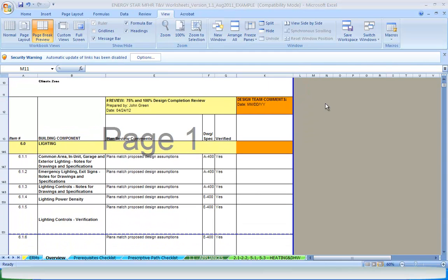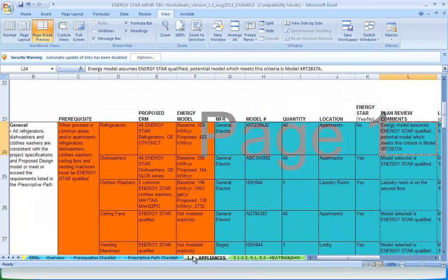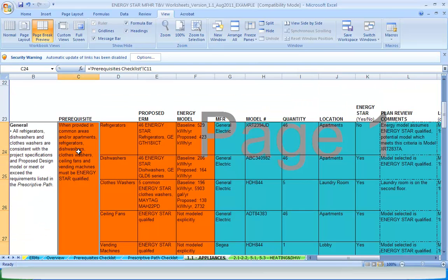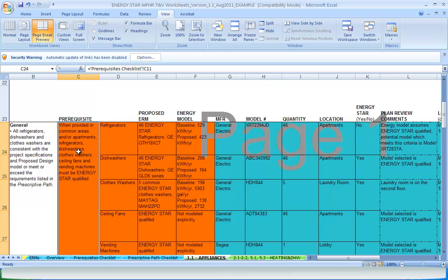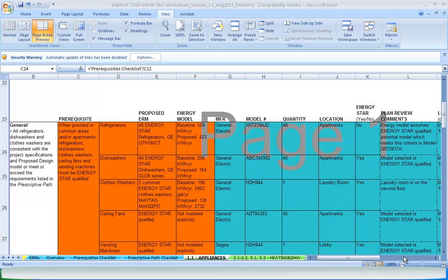Now let's look at how the prerequisites are incorporated into each worksheet. Each TNV worksheet lists the individual elements from the TNV protocols that needs to be checked either in design phase or during construction. For appliances provided in common areas and/or apartments, refrigerators, dishwashers, clothes washers, ceiling fans, and vending machines must all be ENERGY STAR qualified.